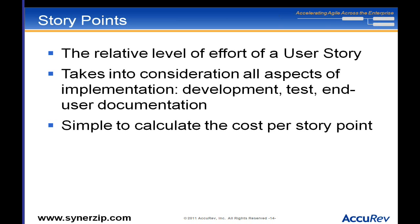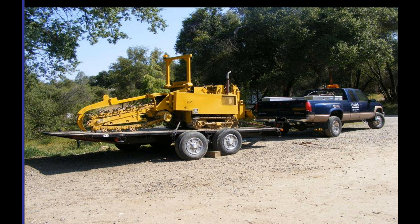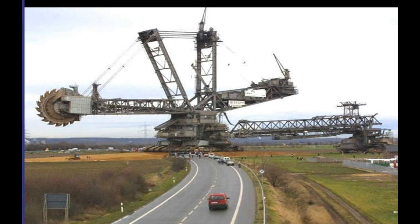Story points separate out the fact that you may be using different people with different skill sets to do the work. You need to dig a ditch and you've got a small ditch-digger or a gigantic one — it'll go pretty quick — but the job itself, whether it's a half-mile or a mile, is independent of who's going to do it. That's what story points do for you.